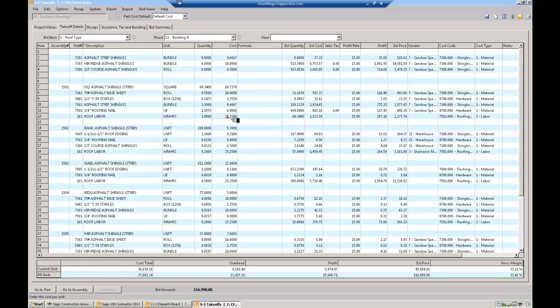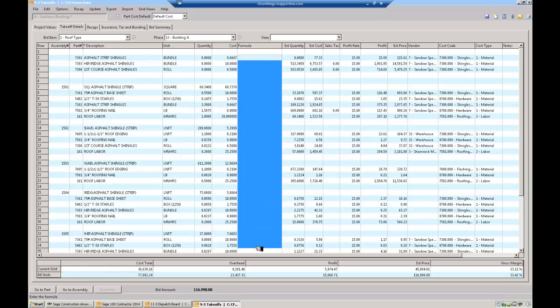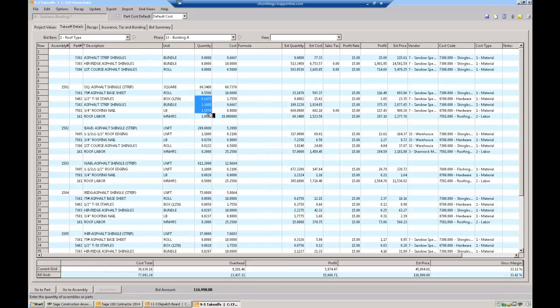You know what? This happens to be a job where it's got a lot of travel, and so we're going to build some extra overtime in on this job. So we're going to make this job a 28.98 per hour. I can just override that for this job. Nothing's hard coded in here. I can change these. If I actually want to have formulas in here to make those calculations rather than hard coding this in like a production rate, I can do so many squares per day or so many squares per hour. I can do that as well. So if you can do it in Excel, typically we can do it here.